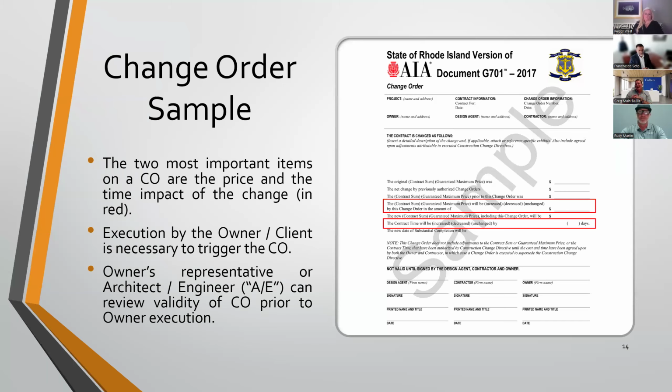Look, I will say that one project I've been on, it was a commercial project. We had 1,800 change orders in 12 months. But the client told us that that was going to happen because of changes that they were going to make to the design, right? So some change orders are expected. Others, in unforeseen conditions, you literally have to plan for.